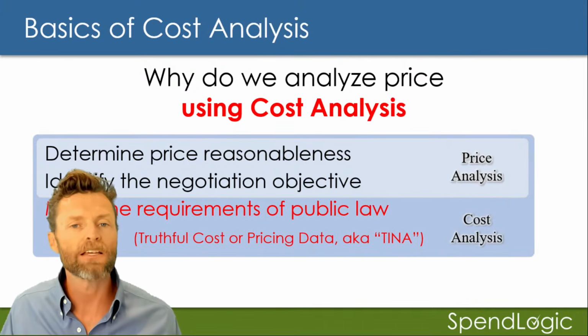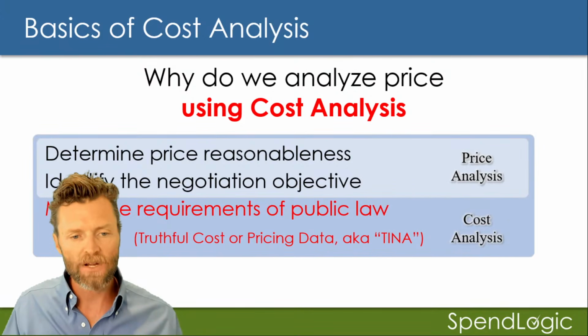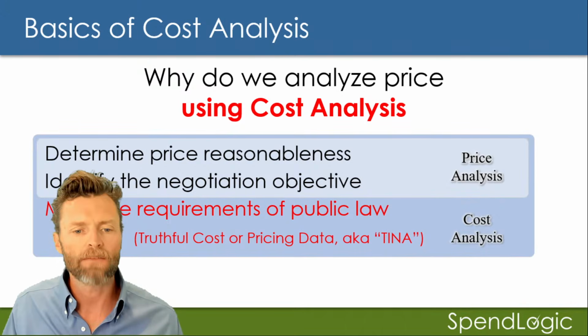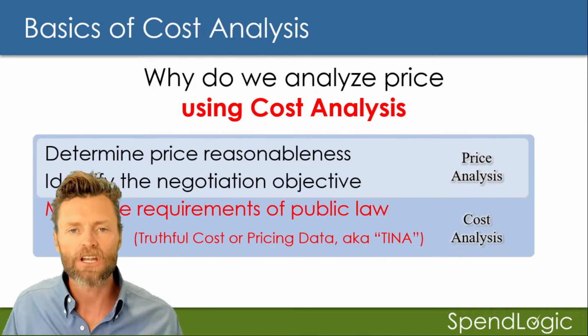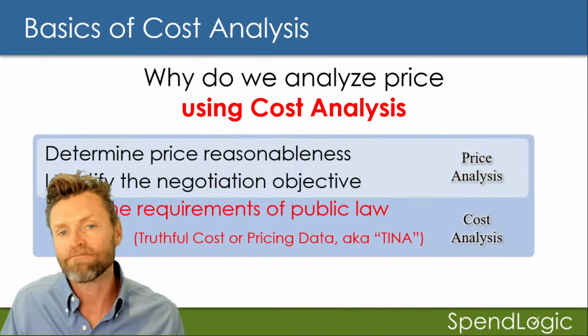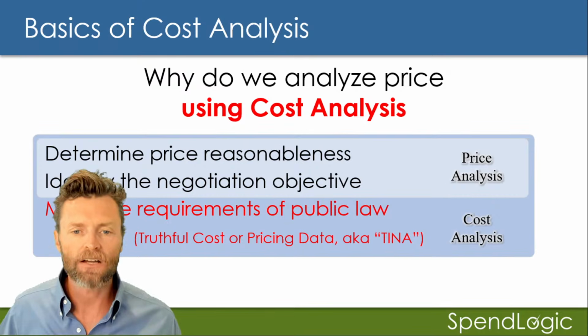Now, if we were to analyze price using cost analysis, it encompasses the same ideas as price analysis. But in this case, it also meets the requirements of public law, the Truthful Cost or Pricing Data Act, or TINA, as many of you will know, the Truth in Negotiations Act. So it basically does the same thing. It gets to the same goal as price analysis, but it goes about it in a different way, relying on certified cost or pricing data.